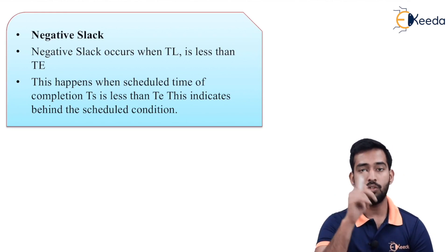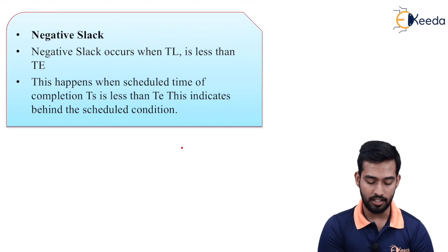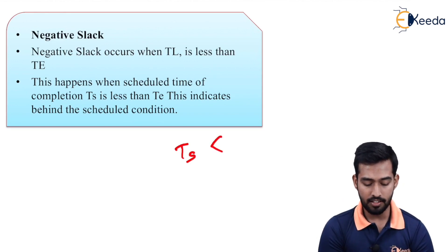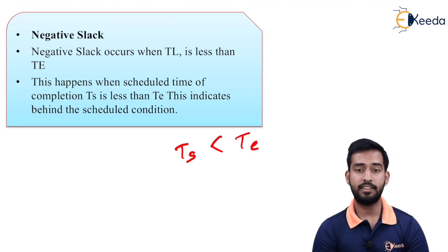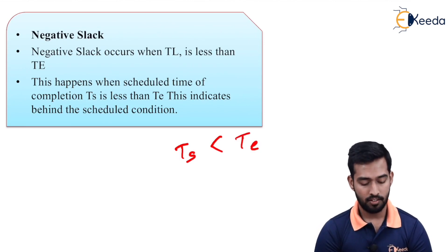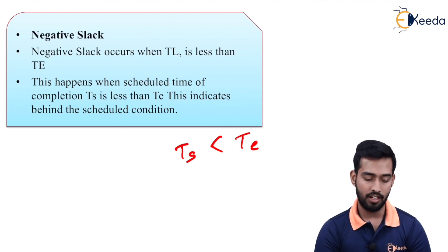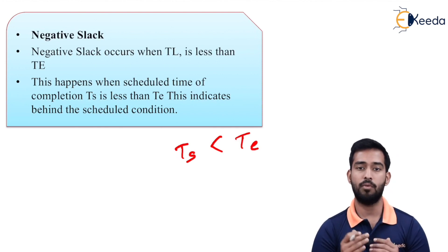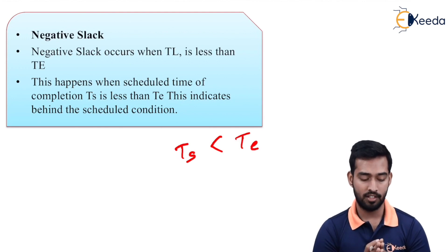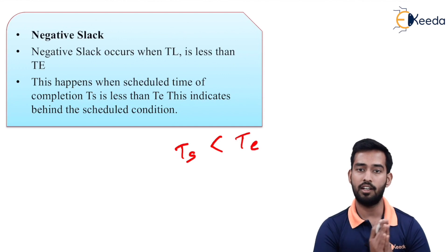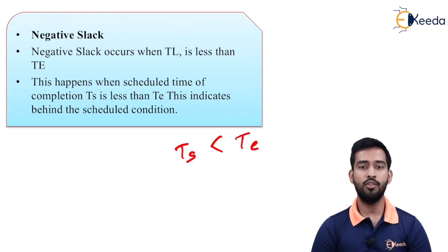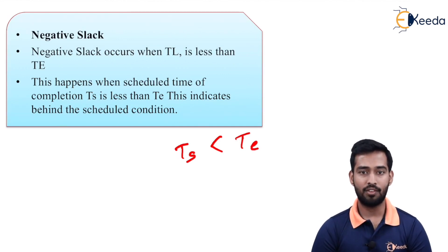Ts is the total project completion time. If Ts is less than Te, the average expected time of completion, then negative slack occurs and it indicates you are running behind schedule. Generally we aim for positive slack or zero slack. If there is negative slack it indicates we are behind our project duration. In this video we have seen what slack is and what are the types of slack — positive slack, zero slack, and negative slack.